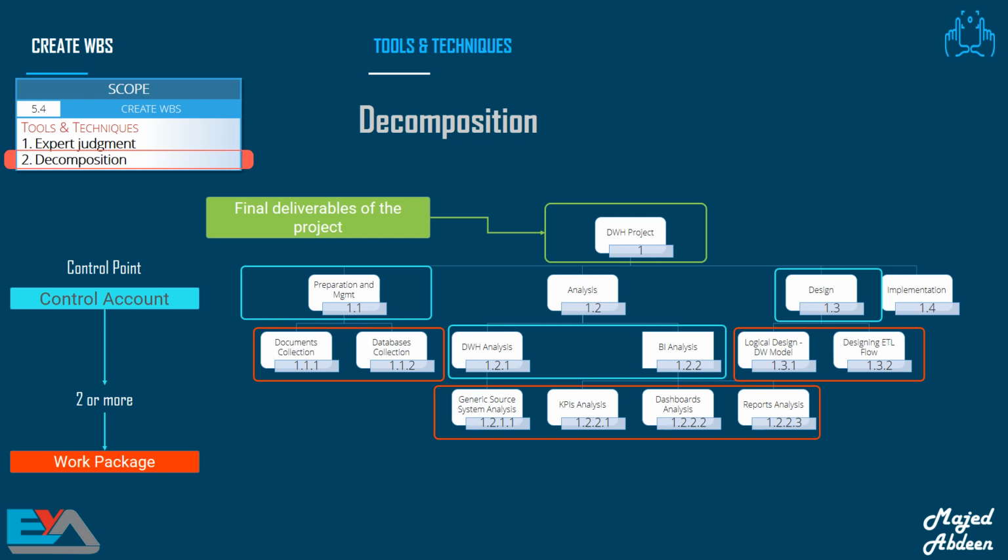To arrive at a work package, the work for some deliverables needs to be decomposed only to the next level, while some others will need additional levels of decomposition. Remember that work packages are unique and shouldn't be duplicated across the work breakdown structure. As I'm sure you've worked out already, the top level of the WBS represents the final deliverable, or project.